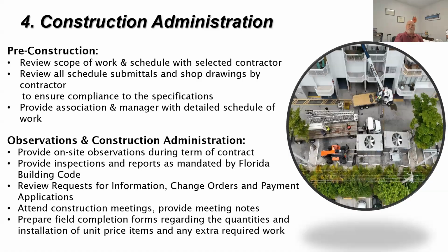And we had a project in Fort Lauderdale we were involved with. Again, it was an unexpected plan. We ended up having a cooling tower sitting in the parking lot for the association for about 7 months, until we could get the new tower installed and everything taken care of. So that's one way of doing it, but again it requires a lot of planning. Where do I put that temporary tower?